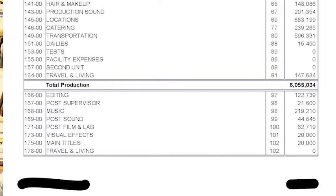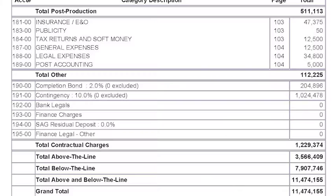Just below that we have what we call total other. That includes insurance, and E&O — errors and omissions — so that when you make a film, whether it's based on someone's life or features a real corporation, you're covered. There are also tax returns and soft money, because in an audit for an incentive you have to show proper tax returns filed in the state of Georgia and process the rebate. It also includes legal expenses for contracts and production legal.